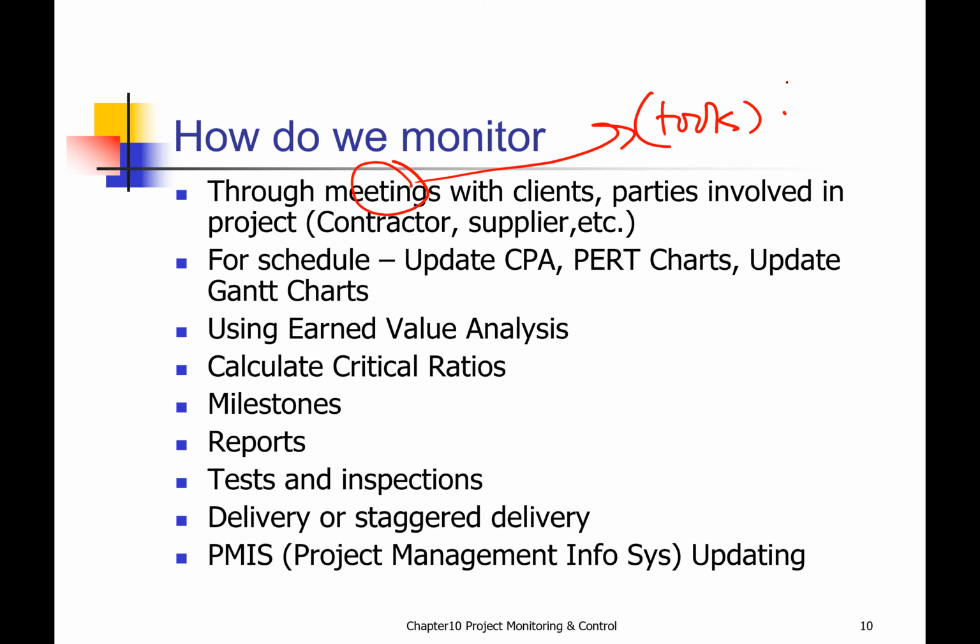Important decisions will be decided, and you put everything into the minutes of meeting, and that will be recorded, and the information could be used as a legal document when there are arguments, because they have decided during the meeting. During the meeting also, people will assign you responsibility, and next week when they conduct another meeting, they will start asking you, have you done the task given to you last week? If for instance you have not done that, you better do something.